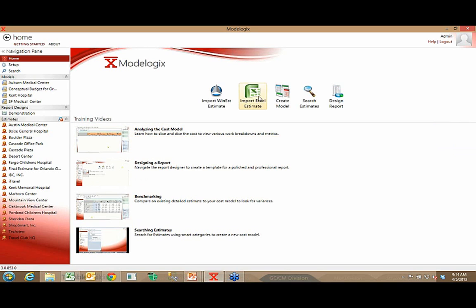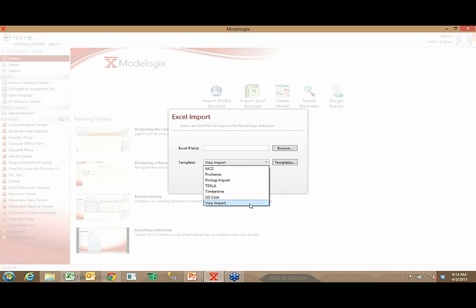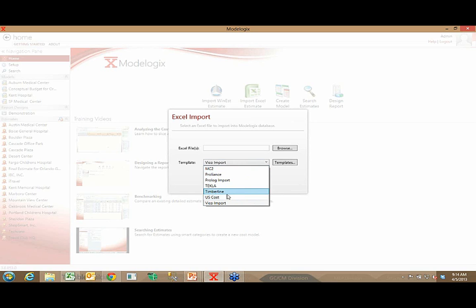Or you're bringing a project in from Microsoft Excel, maybe from another estimating tool or your project management software. You could be bringing it in from VICO, Tecla, ProLiance, ProLog, or another estimating system like MC Squared, Timberline, or US Cost. It doesn't really matter — every one of those tools has the ability to publish a report out to Excel, and as long as you can do that, you have the ability to create a template and import that data regardless of the tool that authored that cost.